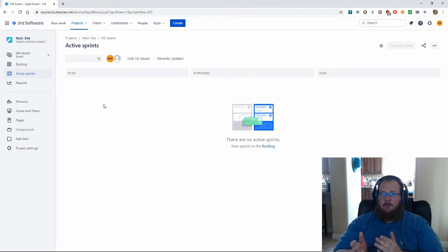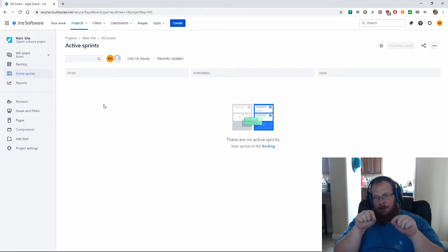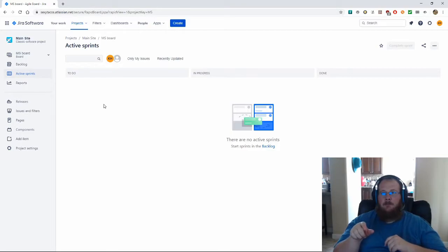Backlog is different from the sprint because the active sprint is what you're currently working on. So out of the entire bulk pool of work, the project managers or the business leaders have selected different items to work on right now, and that is what will go into the active sprint. So I made up a few stories and a few bugs, and I have created them, and I'm going to show you kind of how those interact and work with each other.